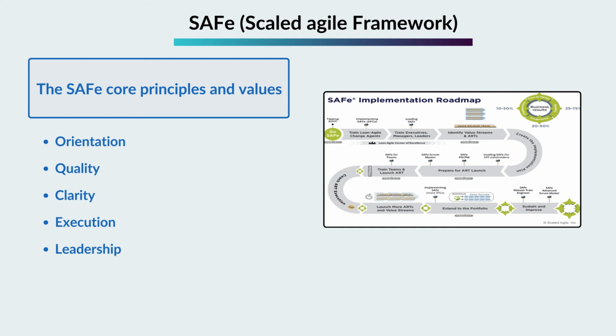Quality. The SAFe Agile framework should always target the quality of the work. The definition of done shall be defined clearly for each product backlog item. The SAFe framework defines 5 major key performance indicators to measure the quality of tasks. 1. Flow of work. 2. Quality of architecture and design. 3. Code quality. 4. System quality. 5. Release quality.